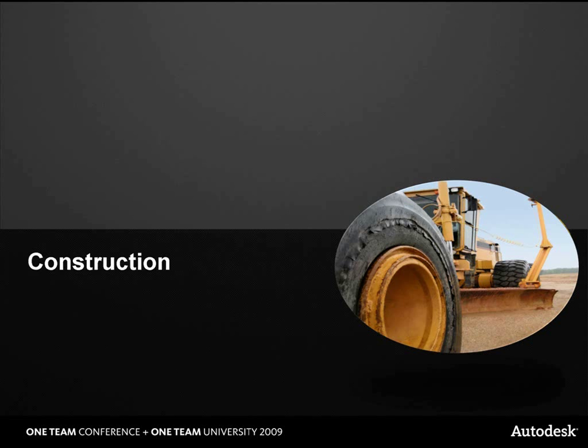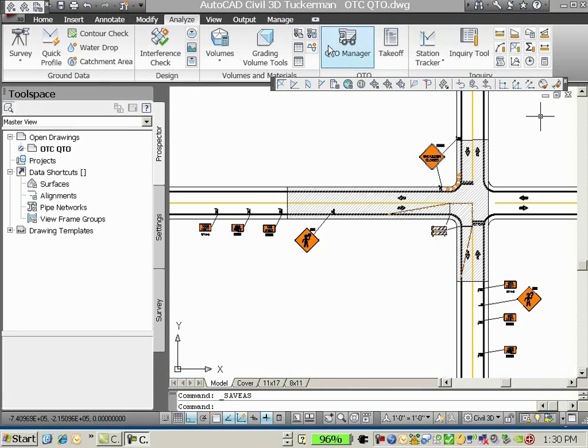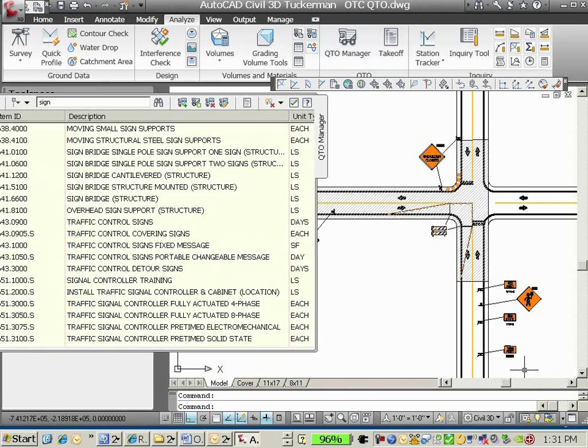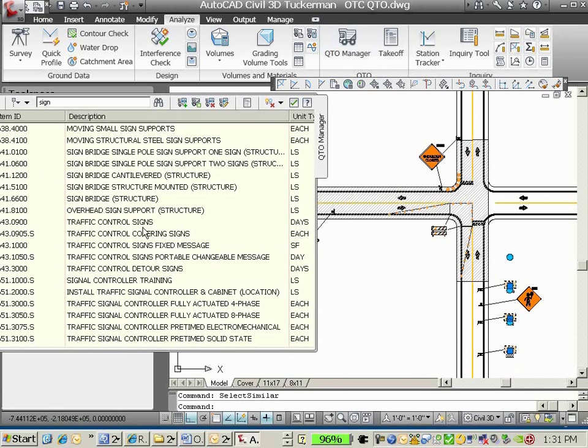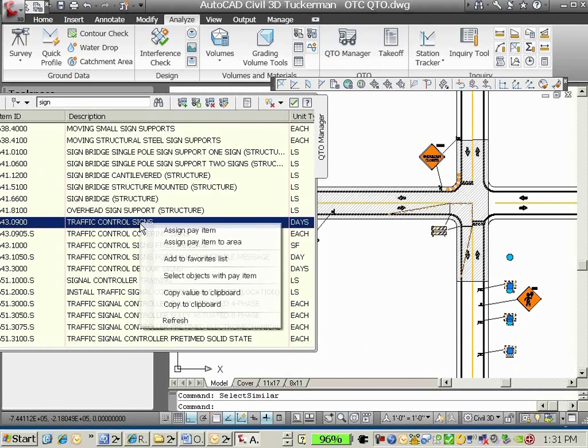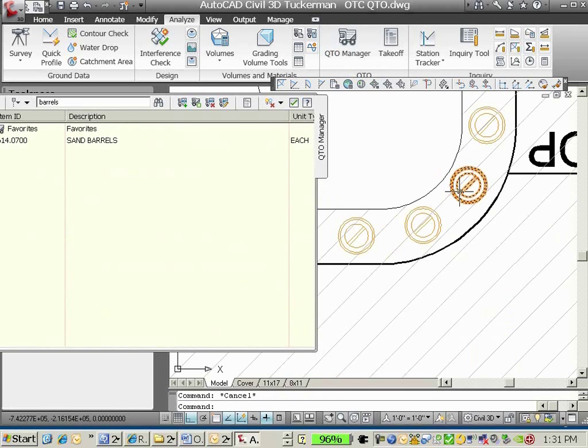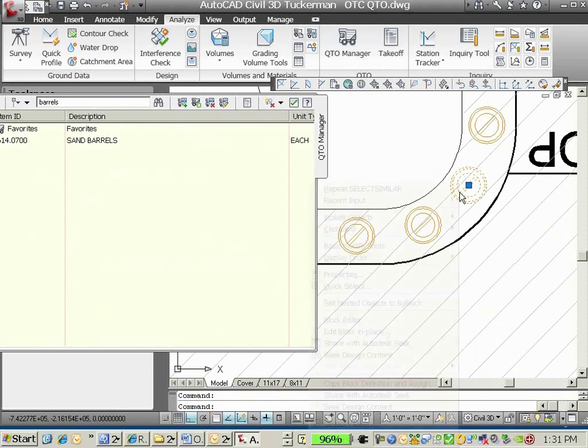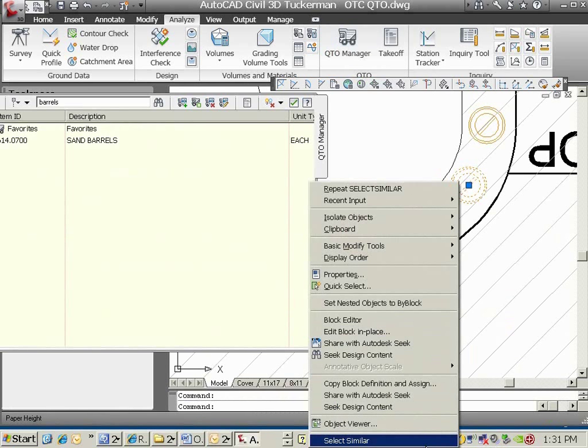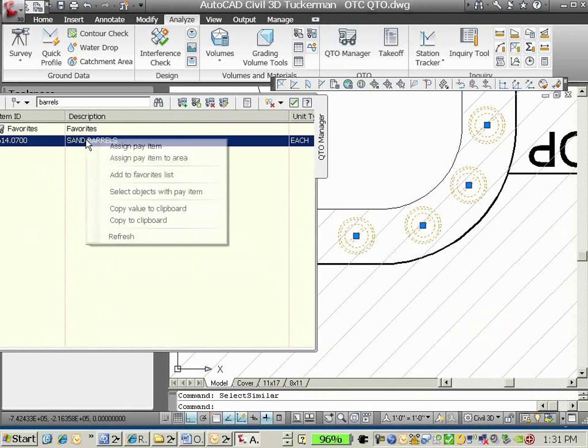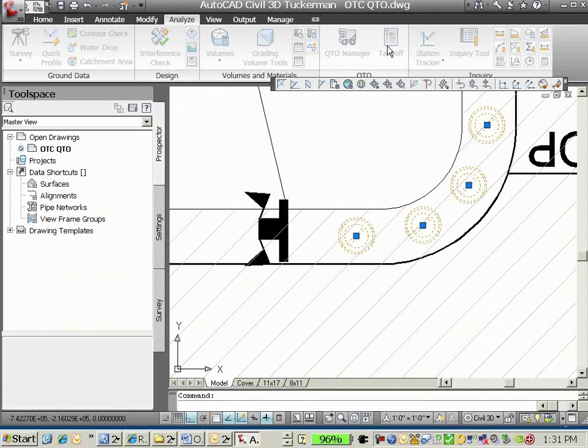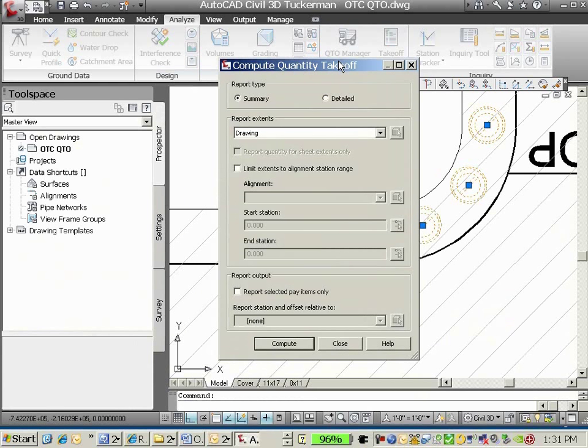With documents complete, we move to construction. Here we're going to use the new quantity takeoff functionality in Civil 3D 2010 to streamline the process of extracting quantities directly from the model. You can assign pay items to objects in the model and have the software automatically count those objects, eliminating the need for manual work and greatly reducing the chance of error.